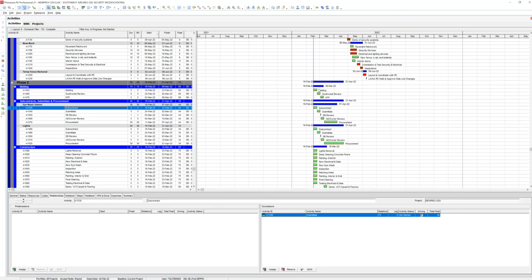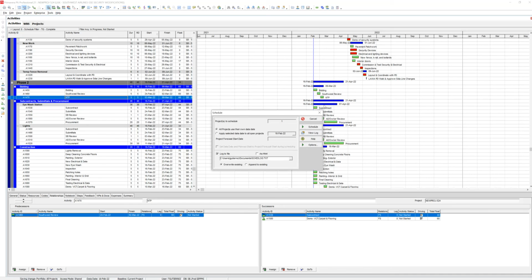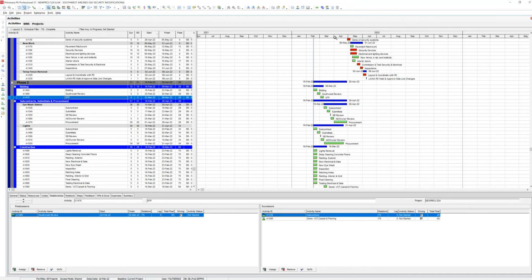Okay. So if you look, we have NTP here. Now we tied in activities within each folder, but now we want to tie in NTP, which will trigger us subcontracting the eyewash station sub, right? So I'm gonna grab NTP, the fork, and push subcontract. I know that should push out. There it is. Right, that makes sense.